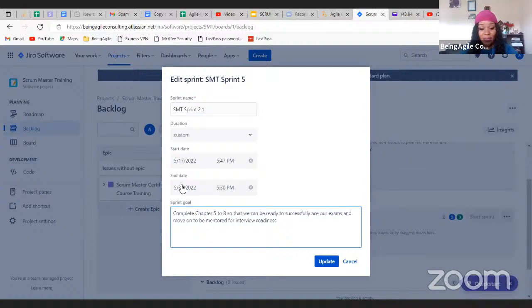Yeah, so that's how a typical goal setting session will happen. And it typically happens maybe during backlog refinement session or sprint planning. But if your goal setting is happening during sprint planning, trust me, then your team is missing something. It means you're kind of late. Usually, if you're doing it well and you're being proactive, backlog refinement sessions are the ideal forum for that. And on the day of the sprint planning, we will just be adjusting just in case anything has changed from the last time we met. So that's how it happens.